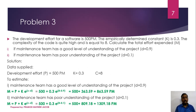To solve this problem, the data supplied: development effort P is 500 person months, empirical constant K is 0.3, and C is 8. To estimate total effort when D is 0.8: M equals P plus K into e raised to (C minus D), which is 500 plus 0.3 into e raised to (8 minus 0.8), equal to 500 plus 0.3 into e raised to 7.1, which equals 500 plus 363.59, giving 863.59 person months.